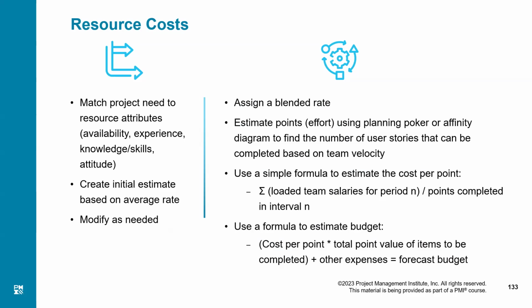How much money is required, we can only calculate when we know exact resources, right? So there has to be a coordination between all the 3 calculations: schedule, cost, and resources. Only then we will have accurate figures. Anyways, as far as the costing is concerned, that is much simpler than schedule. In schedule, we had to create a critical path and all that, which is not the case with the cost. In cost, we simply can add up the cost of all the activities and we will come up with the total BAC.